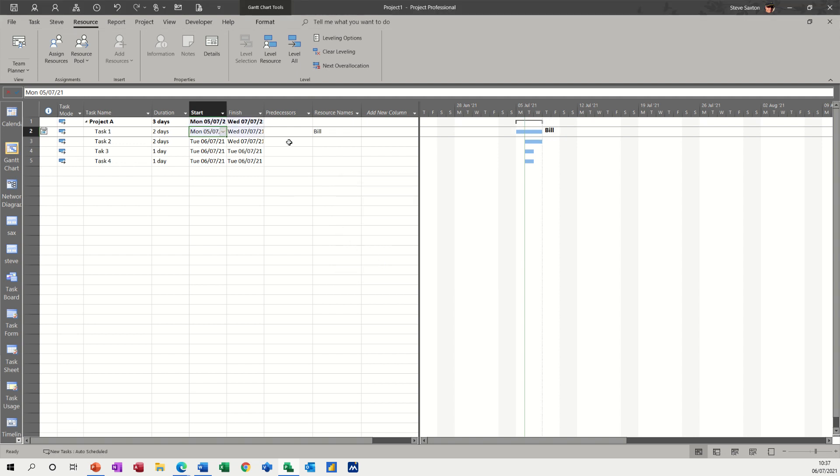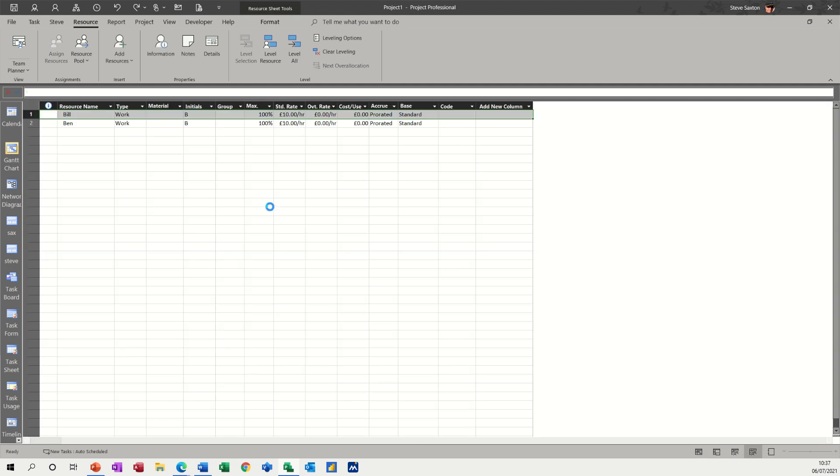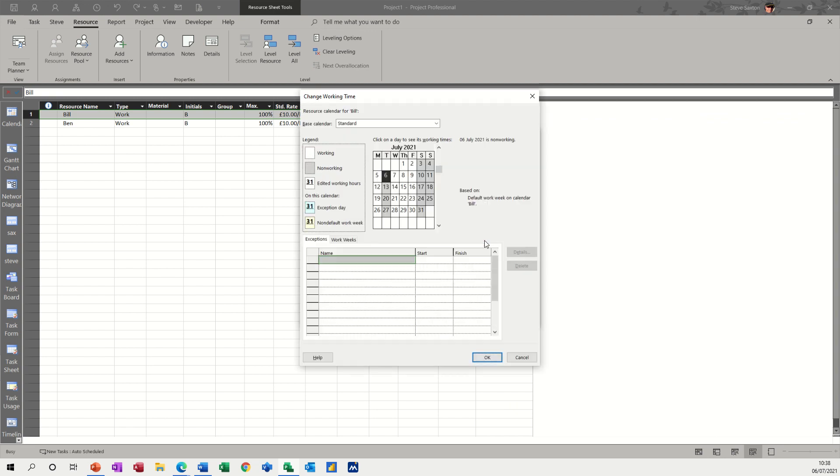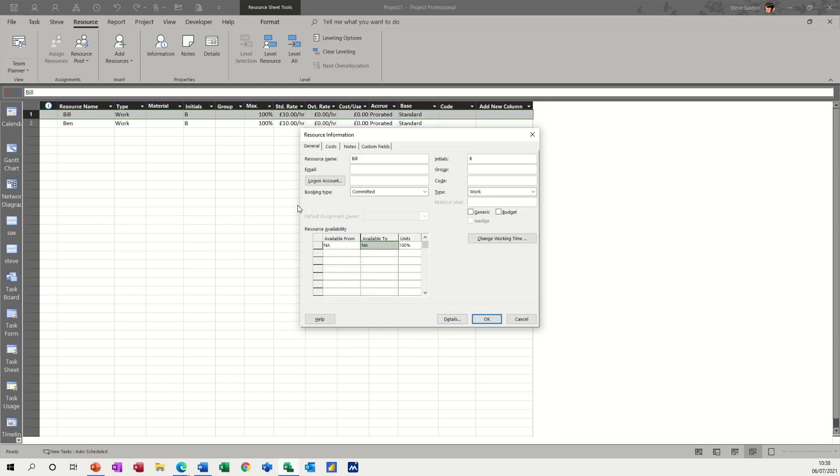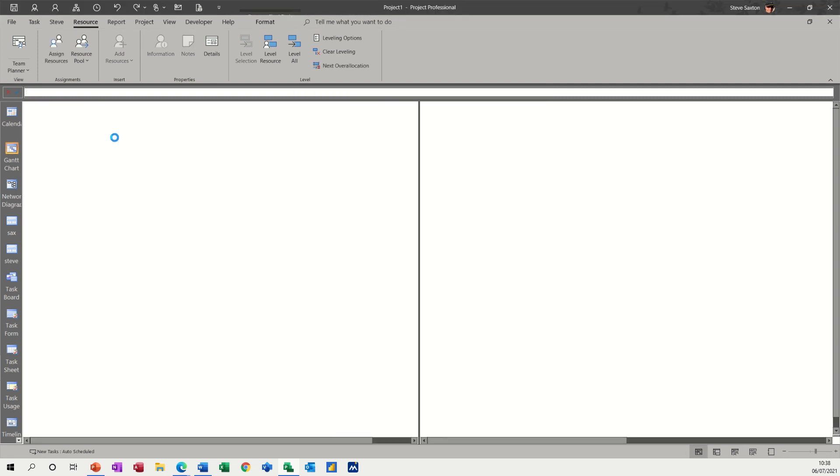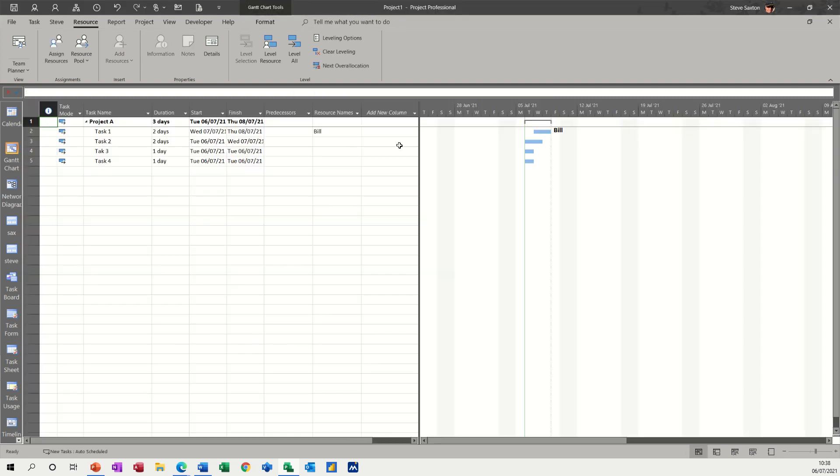Let's just go OK, let's see what happens here. So what happened was, if I just undo that, because Bill is not available until Wednesday, it's actually physically moved that task. So if I undo again and just go back into this and go back into the work weeks, you can see it's not available on Tuesday.